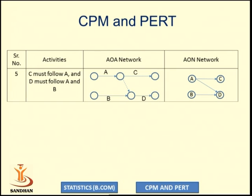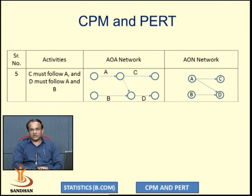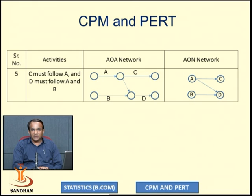Suppose C must follow A, and D must follow A and B. In an AOA network diagram, activity C is the successor for A, while D is the successor for A and B. In an AON network diagram, the activities are represented on a node.